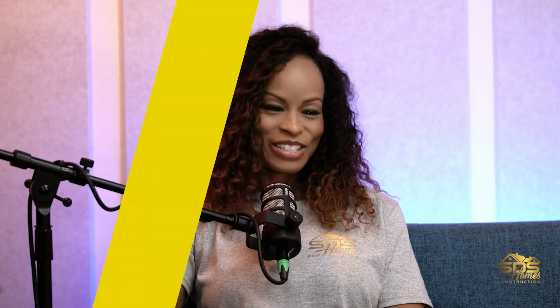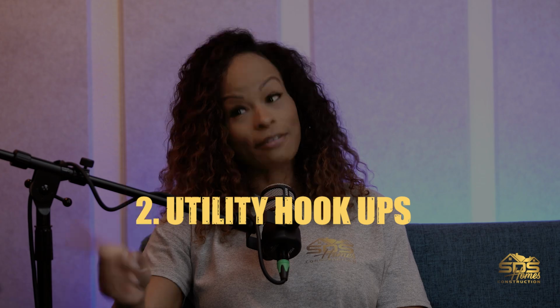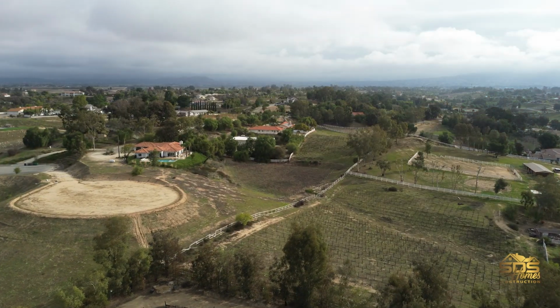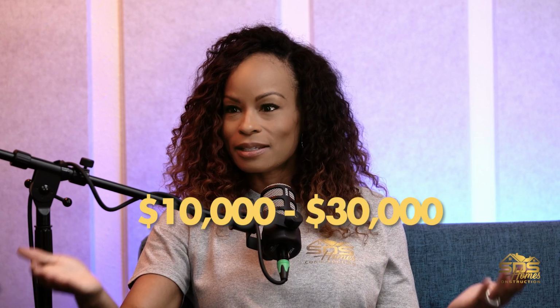Number 2, utility hookups. So you have your land, but can you actually live there is what's important. People forget about electricity and water, the things you need in order to actually live on your land. That could be anywhere from $10K to $30K for utilities and making sure that you have everything. Are your utilities right there, or do we have to trench down a mile or so in order to get them? Those things are important.